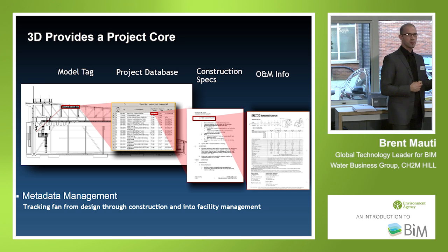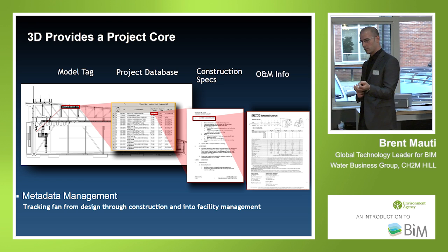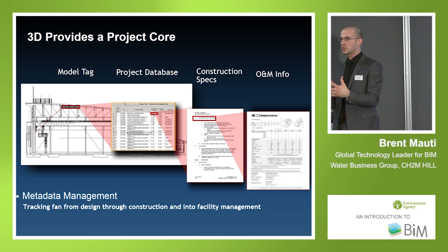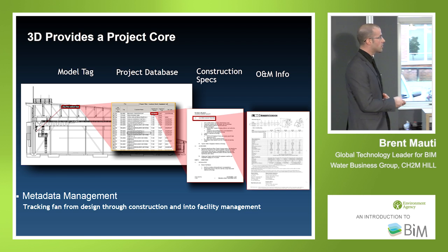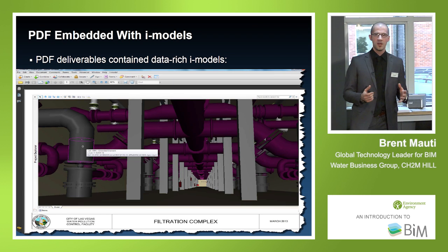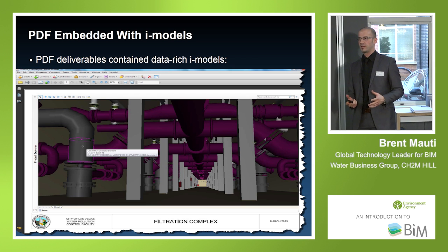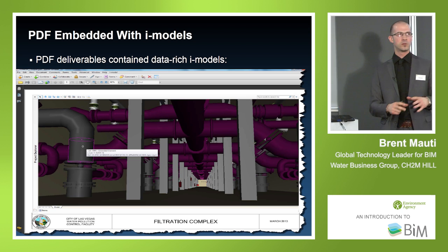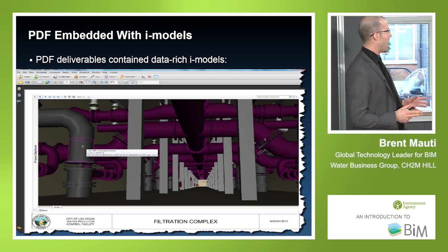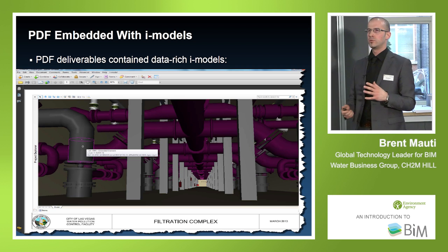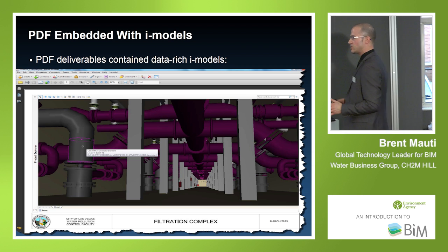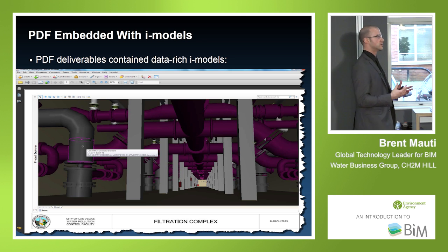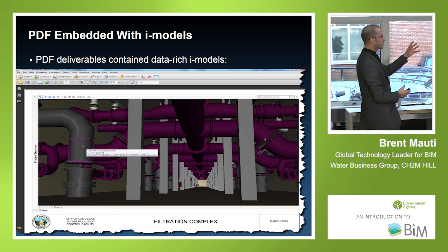Is the information in the BIM tool? Is it being authored by the authoring tool? Is it being linked to another system? Is it being associated? How does all that information come together? So with our client, they pushed, well, we want linkages. They knew that the BIM model didn't house everything. They had a robust asset management system. We had to go in and BIM the existing, do a $20 million US add-on, and build linkages to and from the BIM to the asset management system. So step one was we want the turnover to be a deliverable, a sheet of paper interactive with the model.